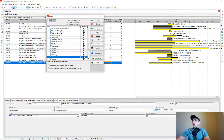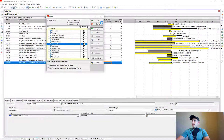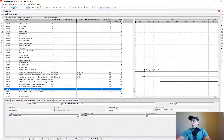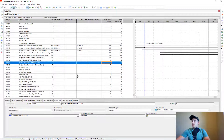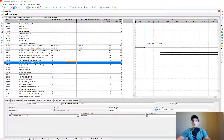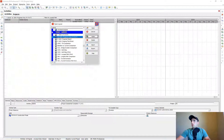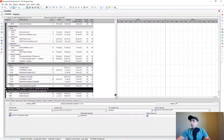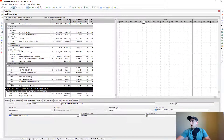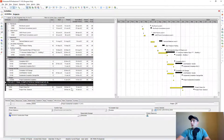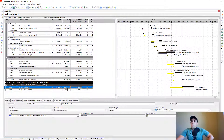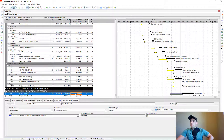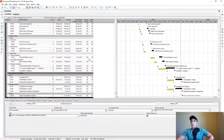Now let's filter for the longest path and see based on pure progress what my completion date would have shifted out to. Scrolling down, we can see that based on pure progress the completion date would have pushed out quite significantly — to March 29th, 2024 instead of January 15th, 2024. And that's how you do a pure progress update in P6 using the Global Change feature.